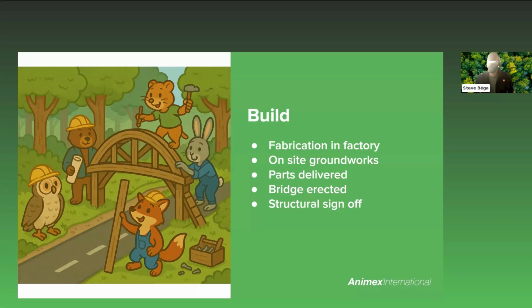Obviously, during your early budget stages, it's important to budget accordingly. So allowing any contingency for potential alterations and obviously the rise of inflation, if your project is expected to span multiple years, is very, very sensible. But overall, these costs are higher than some of the structures, particularly that Tremaine will share from around the world shortly. And this is mainly because these structures in the UK are more substantial and require us to adhere to the UK highway safety and engineering requirements that we have in this country.